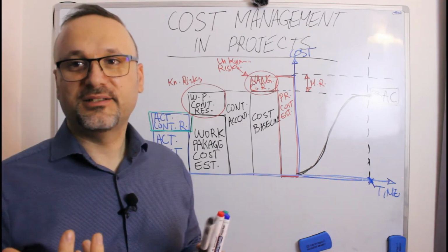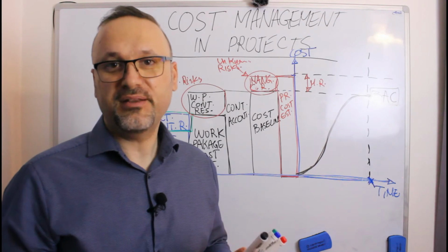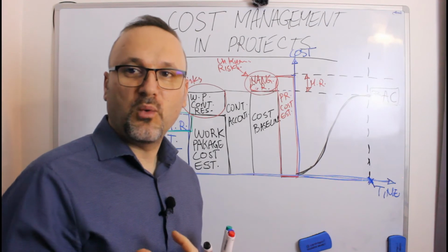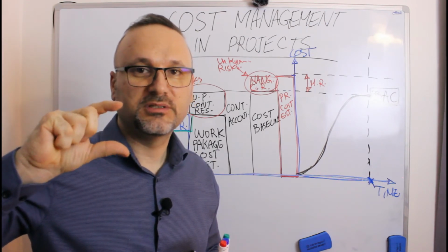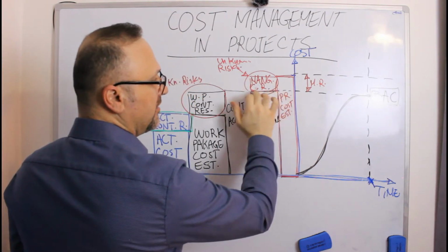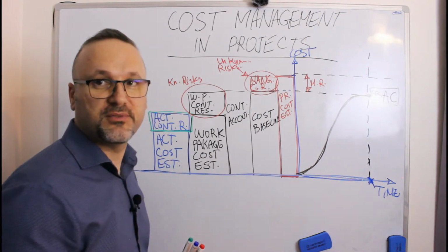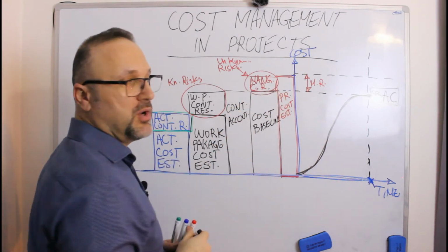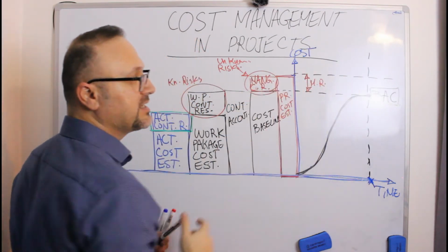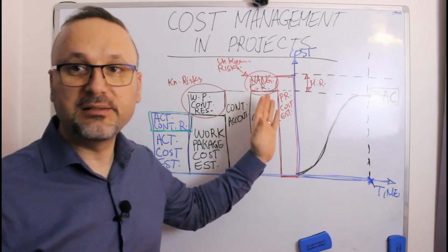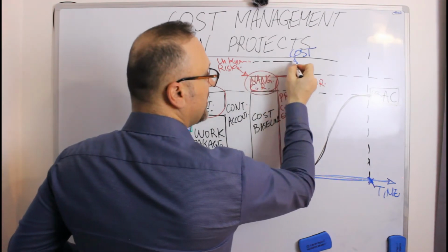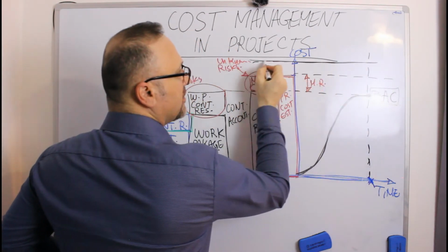in my contract I should make some benefit. So I should make some profit. The profit will always be an amount over what I have spent. And if I am spending this amount with the contingency reserve, the cost of the contract should not be less than this total amount. Otherwise, the contract or the full project will fail because we are over budget. So the contract amount will be somewhere here. Contract amount.